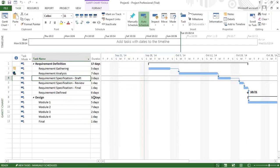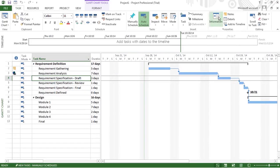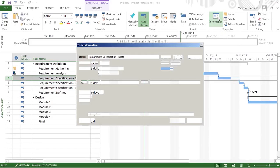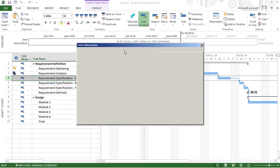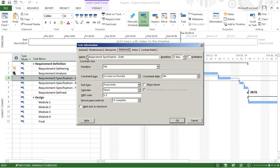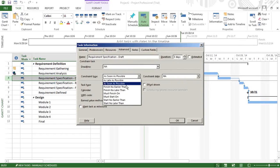Let's go to Requirement Specification Draft. We go to Properties, Information, and from there to the Advanced tab. You have the name of the task, Requirement Specification Draft, and the constraint type is As Soon As Possible.